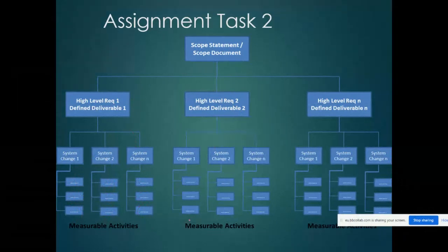But any decent project management software, when you put in values on each of these items for time, as well as how many hours or days it's going to take, there might be certain tasks that take a number of days. You add all of that up, and suddenly you've got your project duration for the whole project. Well, actually, first, for duration, you need to sequence everything and do your network diagram, because duration doesn't just get added up like money does. Okay, so that's one example.